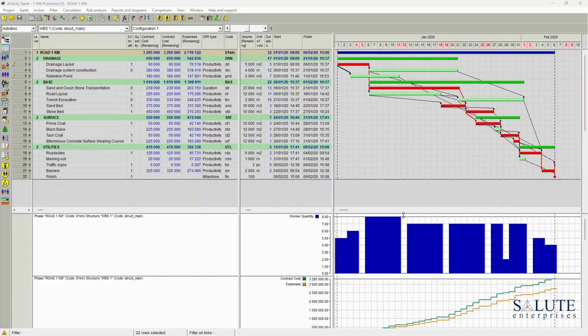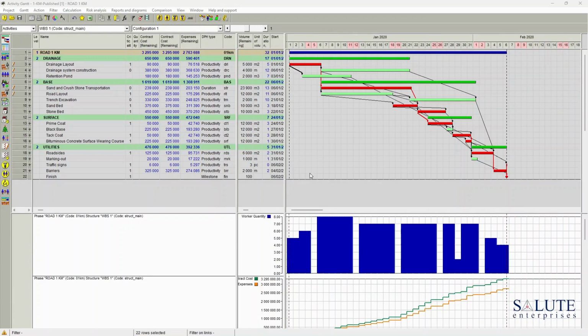Once you have a fully established plan for your project with all the scope of work, activities, dependencies, resource assignments, and cost, all calculated, verified with your stakeholders, and formally approved as a baseline, then you need to start tracking the progress. In other words, adding performance input or actuals. To be able to add the actuals to your project, you need to select the tasks. I'm going to select the project summary task because we're going to add actuals for the whole project.